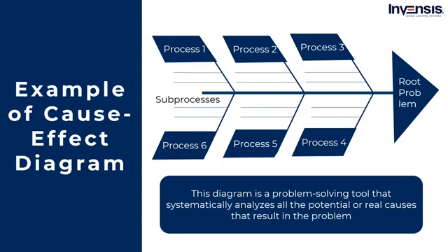Now, while creating a fishbone diagram, it is important to have a thorough understanding of the issue, and the team members involved should have prior experience and be familiar with the issue. Also, the conversation should take place under the supervision of the project manager, and they should consider all potential factors and include them in the fishbone.